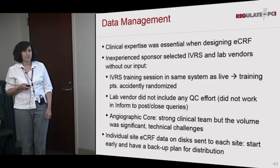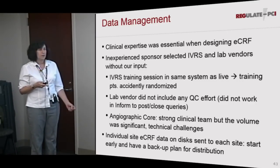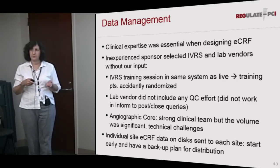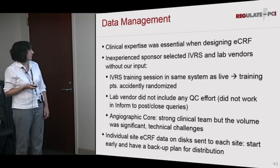We also had a lab vendor that the contract was held with the sponsor, and they didn't put any QC effort into their budget. And so they didn't go in when things weren't there or things didn't make sense and post any queries. So our data team had to kind of come in and do that work for them, which we had not planned to do nor had budgeted for.